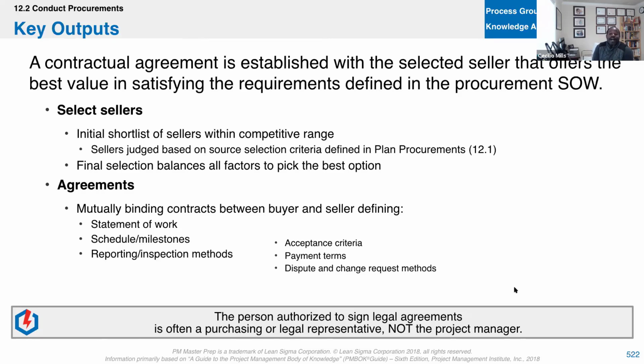Even though we looked at the 5 conflict resolution techniques, when stakeholders have issues with each other, they are responsible for resolving those disputes in the first instance. And if they cannot resolve those disputes in the first instance, then it gets escalated to the PM. All right, so we have risk owners implementing risk responses, PM's not responsible. And then we have conflict resolution in the first instance, the PM's not responsible.